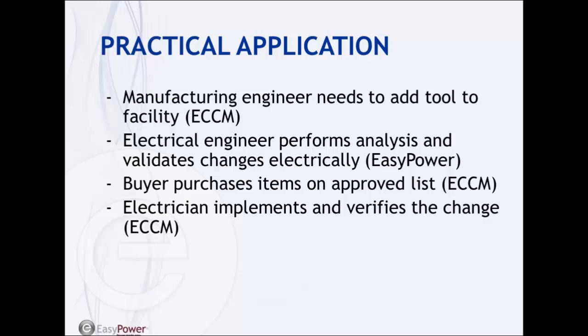The electrical engineer themselves will receive a notification of this change request, and then also see that request within EasyPower, and we'll show that synchronization. And then they can perform the analysis that they're an expert at within EasyPower to verify, or validate I should say, that these changes are acceptable and meet the standards and safety requirements of the company. And then they can do an approval within ECCM itself. Then the buyer will get notified to move forward with the purchase of this equipment, and then let the electrician know to implement the change. And both those steps can be done strictly within ECCM.